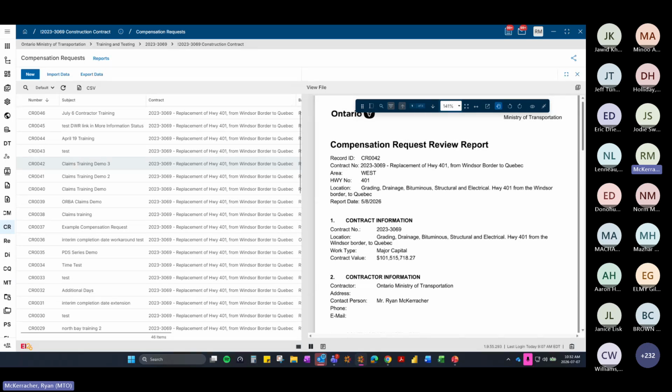If the CO is quantity adjustment, we know the quantity and the price. Why can we not add the quantity and the price in the CO? I'm saying nothing's going to hurt the system if you do, and if it helps the contractor with the adjustment, then you might as well do that. Yeah. But I'm saying it was designed to wipe itself purposely so that you're not disclosing your estimate to the contractor for things like lump sums, time, materials, item price negotiations. So yeah.